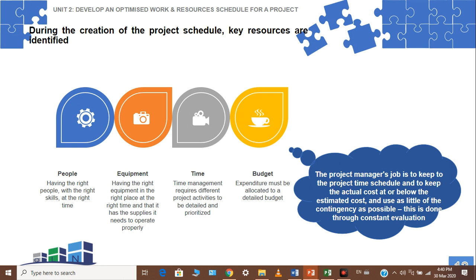It becomes difficult to actually define. In an instance like that, where a salary is given and you have to be part of a project, the people do not cost the project anything. They cost the company a salary, and the project is not costed by the person, but the person is still written or listed as a resource. As soon as you start to outsource or pay overtime, that is when a person is going to cost you and going to affect your budget.